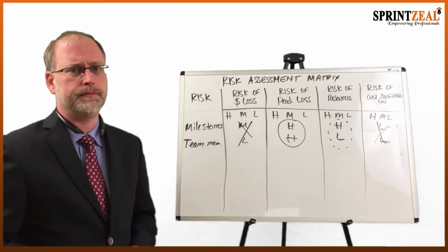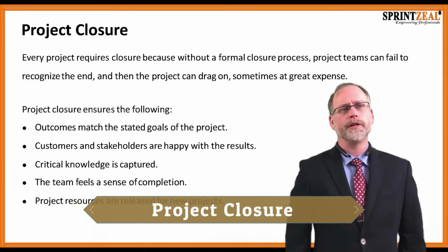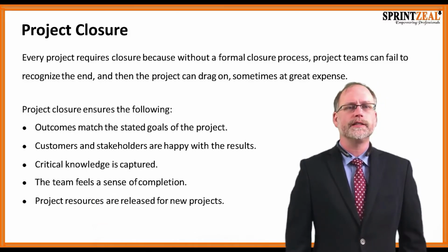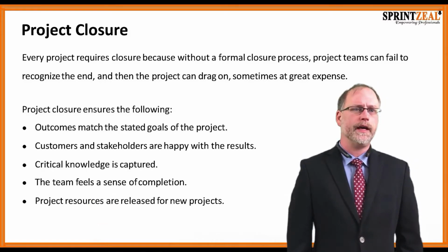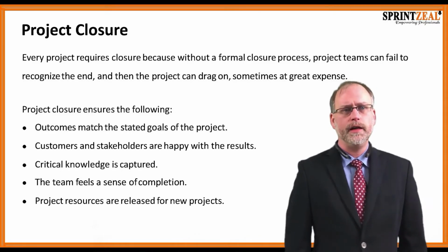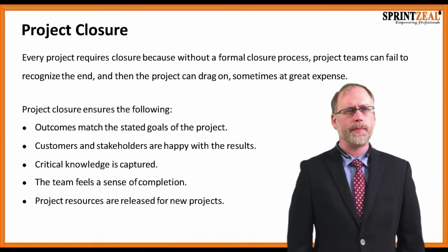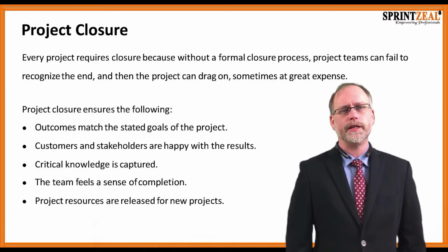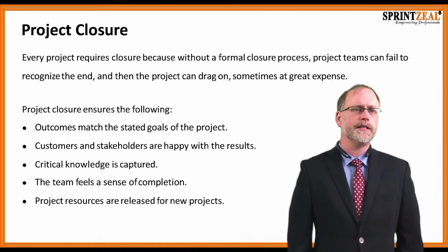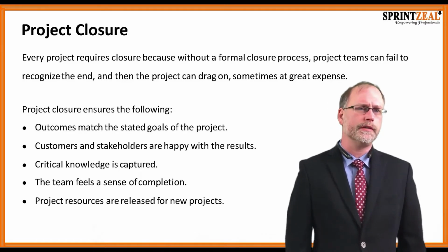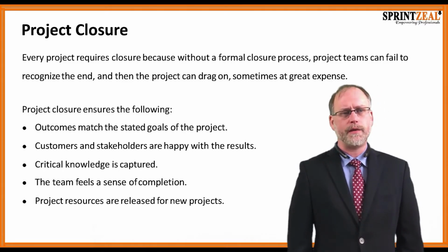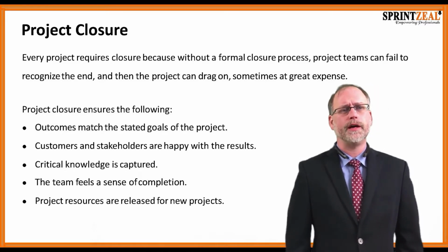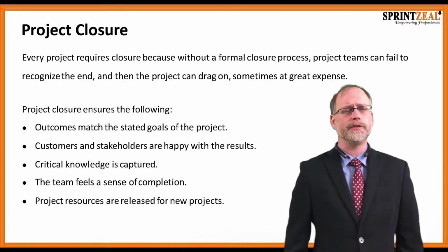So every project requires closure because without a formal closure process, project teams can fail to recognize the end. And then the project can just drag on, sometimes at a great expense. Now, project closure really ensures that the outcomes match the stated goals of the project, that the customers and stakeholders are happy with the results, and critical knowledge is always captured. And also that the team feels a sense of completion and that project resources are released for the new projects.